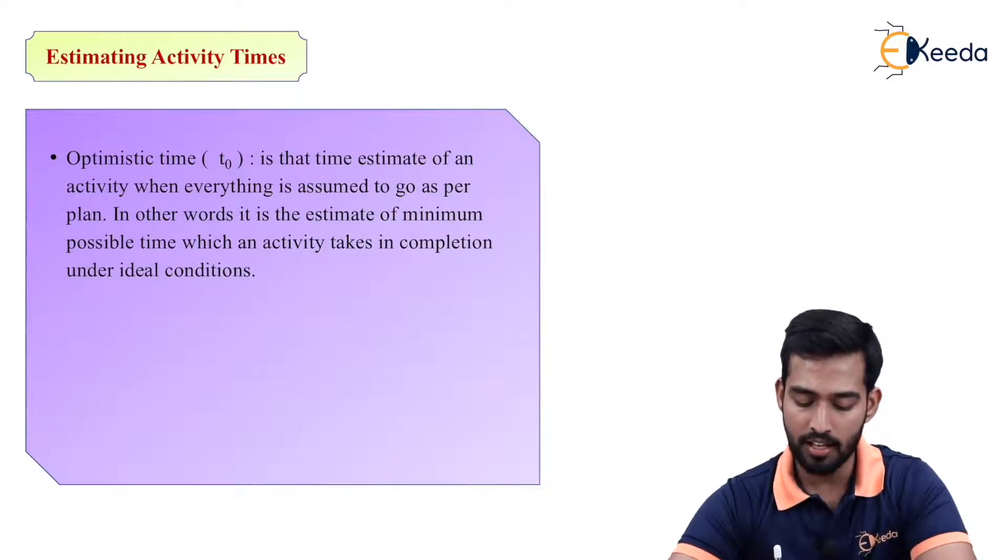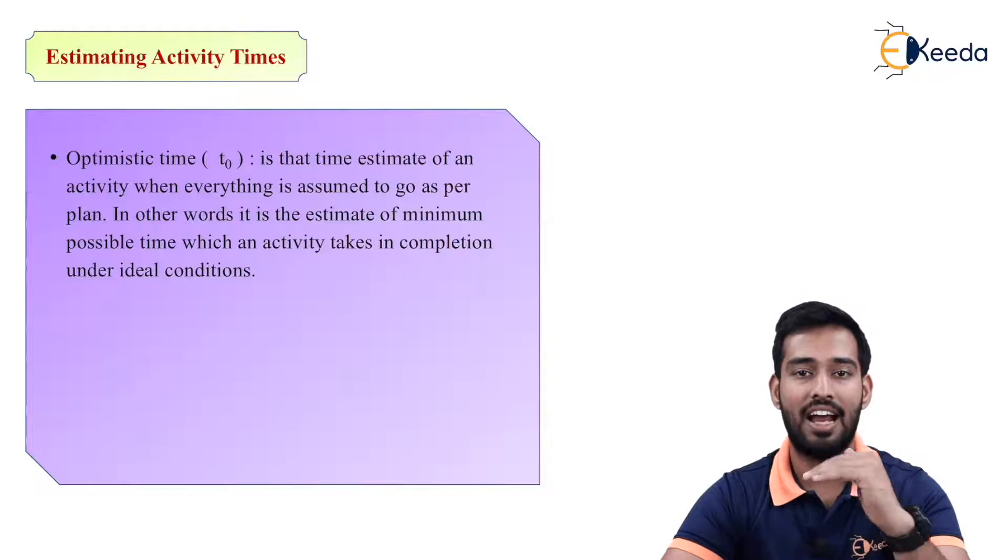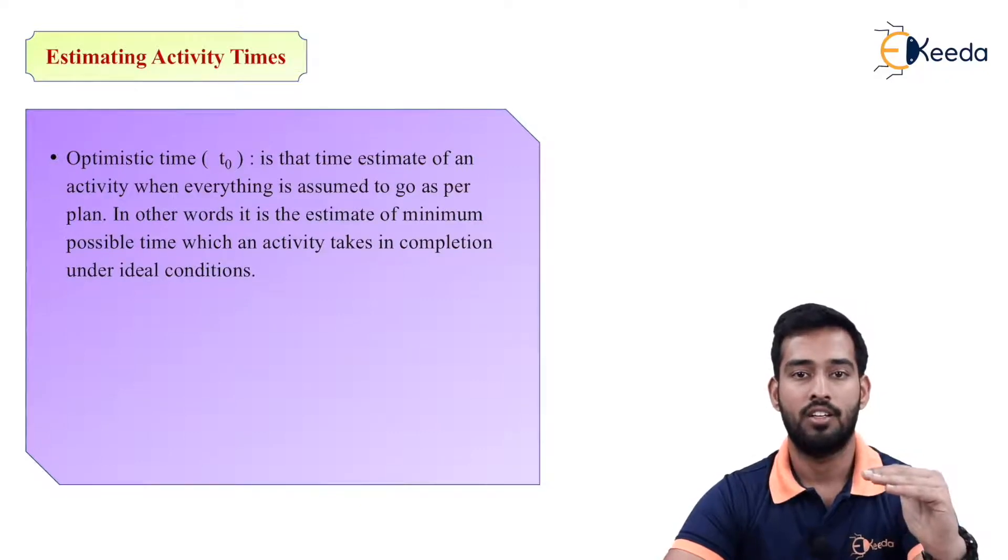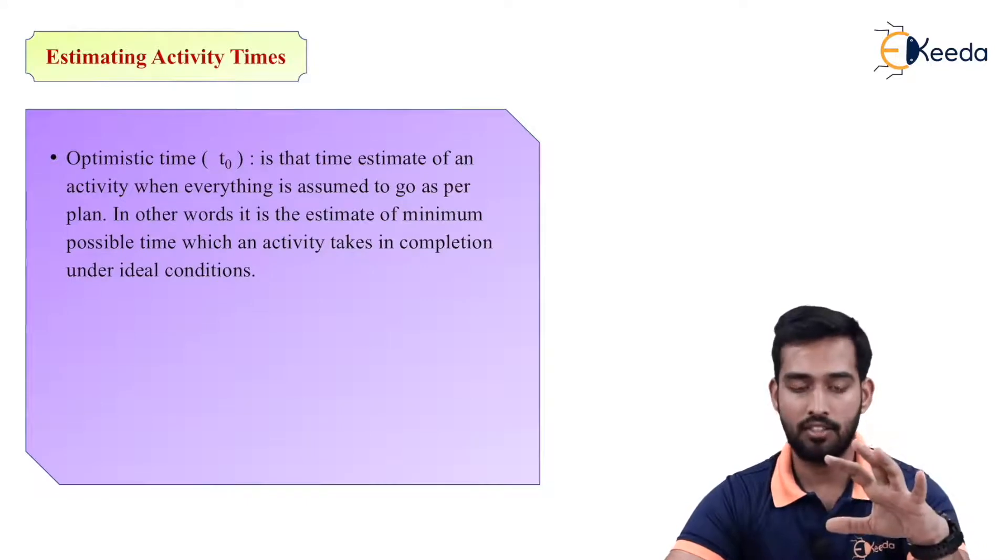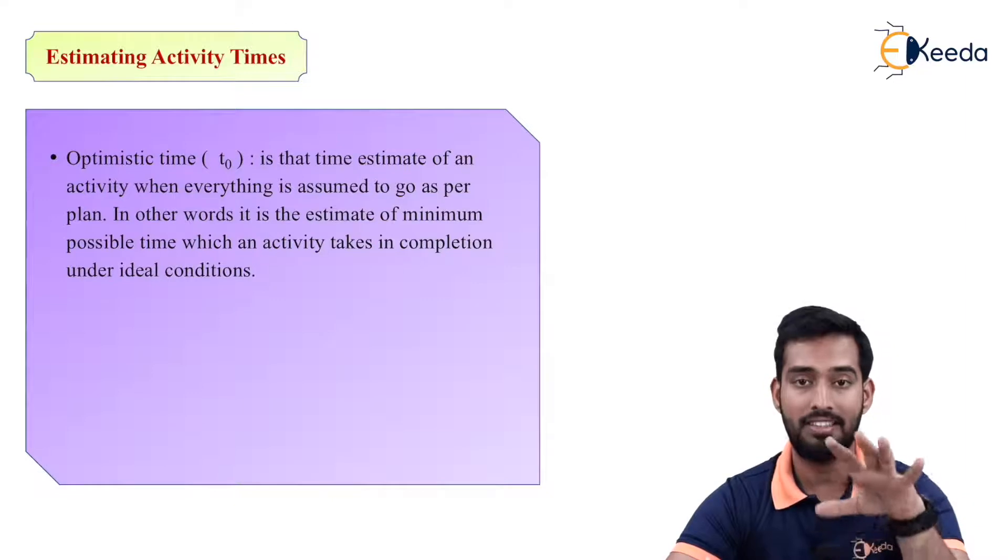In other words, it is the estimate of minimum possible time which an activity takes in completion under ideal conditions. As we have seen, all the conditions are ideal for your project. So whatever you require, no other events are hampering your project. So in such type, it is known as optimistic time.